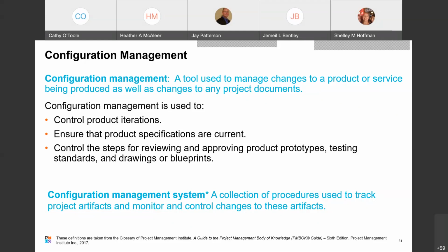From my perspective, as far as project documents, my configuration management is manual because it's just all about numbering things 1, 2, 3, 4, and 5, or using the dates that you change things on, like your project documents updated on August 4th, updated on August 12th, updated on August 31st. That's how I keep track of my project documents, but others have other standards that they might use.